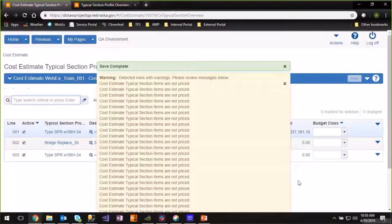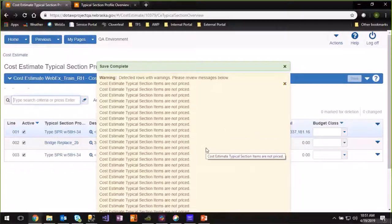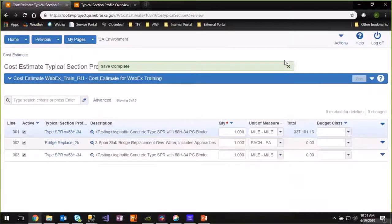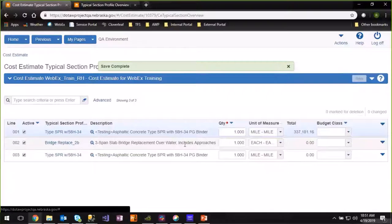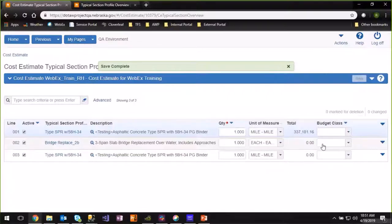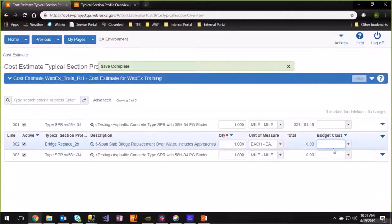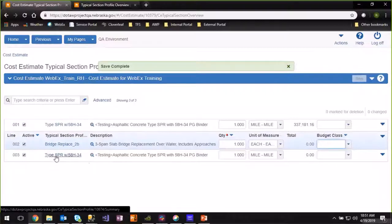Once that process has been completed and the profiles have been added to your cost estimate, you'll likely get a warning box saying that the items aren't priced. This is normal since all the typical section profiles have been set up with quantities of zero — there's no quantity to establish the price against. Go ahead and hit the X on that box to close it. You can see the typical section profile name, description, quantity, how it's measured, and the total price. There's a budget class field — you can pick one if appropriate for your situation or leave it blank.